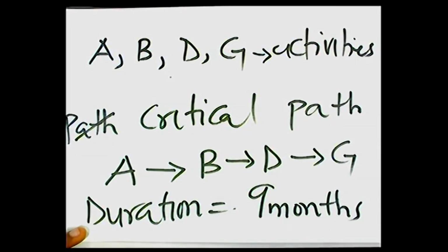You're done. You've answered everything. So if you look at the requirements of the question from the slides, we drew our network diagram and we did everything. We identified our critical path, which is A to B to D to G, and then the expected completion time for the project is 9 months. I hope so. You can see the solution here in the question, A to B to D, and it's 9 months.